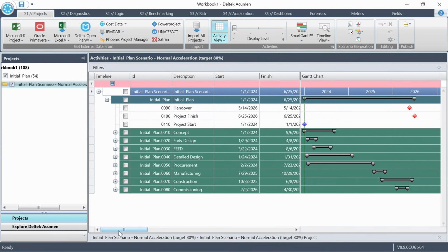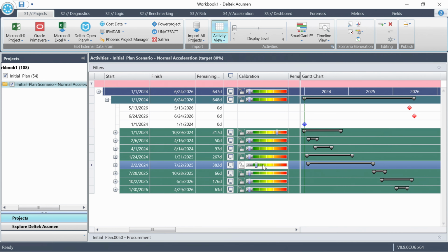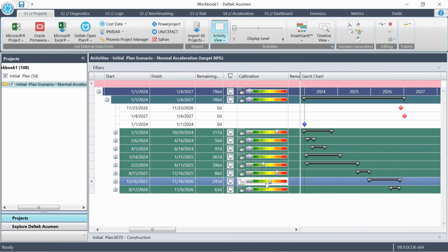Additional scenario revisions can be made with these sliders on the S1 project screen, which will instantly nudge areas of your choosing earlier or later, depending on the situation. So in addition to Acumen's automated controls, you can set your own overrides when the team has specific manual changes to make as part of the hypothesized scenario. By using Acumen's intelligence and that of the team, you often can come up with a plan that meets the objective while staying within the bounds of reality.